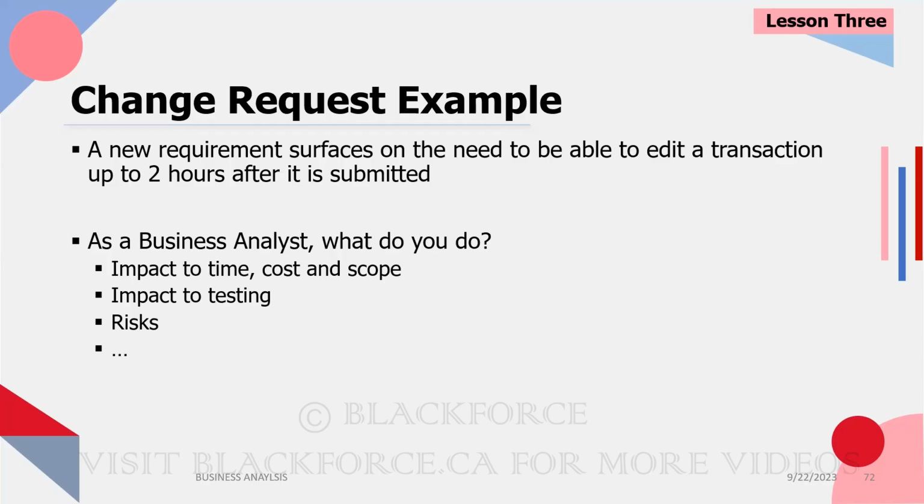But it helps the change control board when you've done the hard work of understanding and documenting the impact to time, cost, scope, impact to testing, the risk involved. When you present all of that information to the change control board, you've just made their life easy. They're going to like you a lot. And you've given them enough information to be able to make an informed decision on that request.